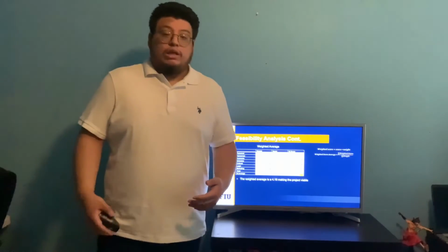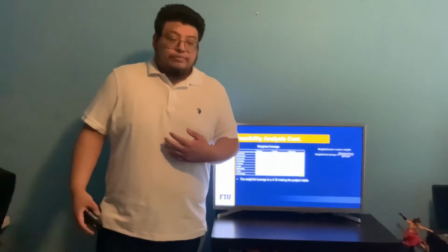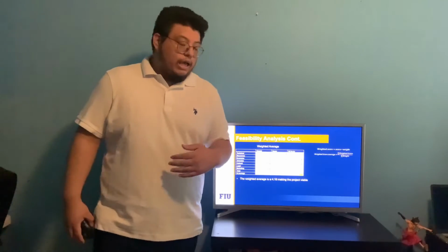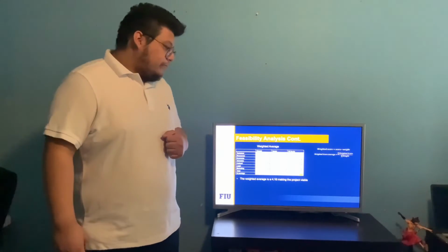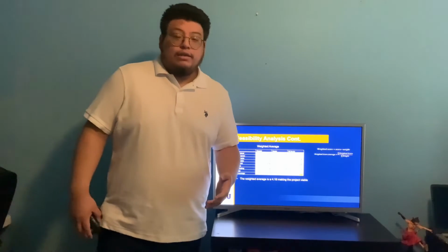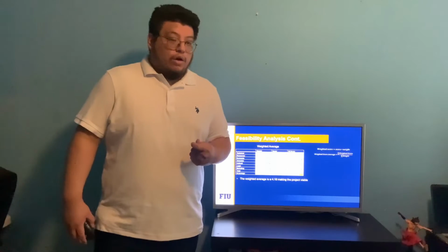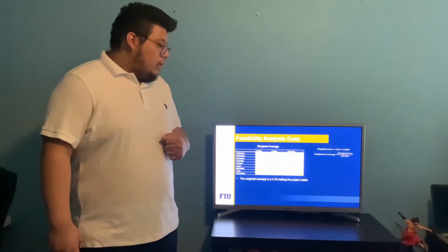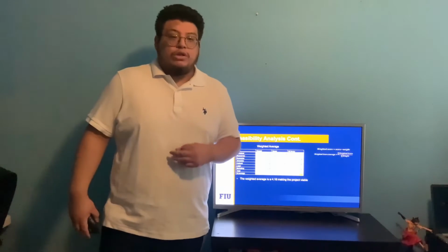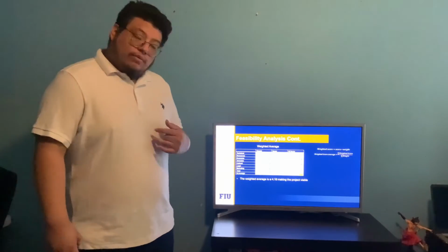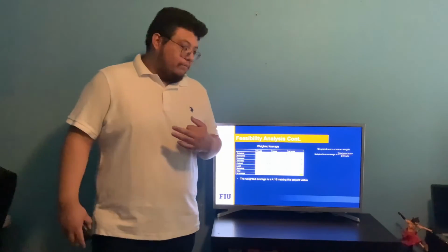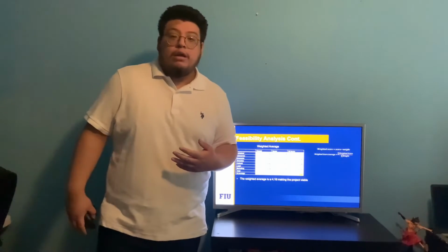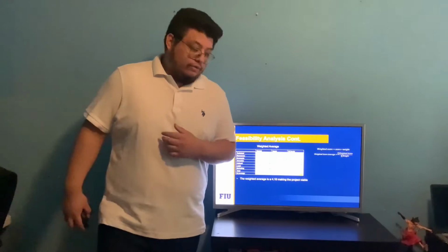For the weighted average, which will give us the overall score of our project, we use the previously analyzed score individually of each section, and also the weighted score of the previous chart. To get the weighted score, we take the score times the weight, also denoted in the table as W dot score. To get the weighted score average, we use the sum of the weighted scores over the sum of the weights to get a total of 4.18. The weighted average is 4.18, and it is greater than 3, thus our project is viable.